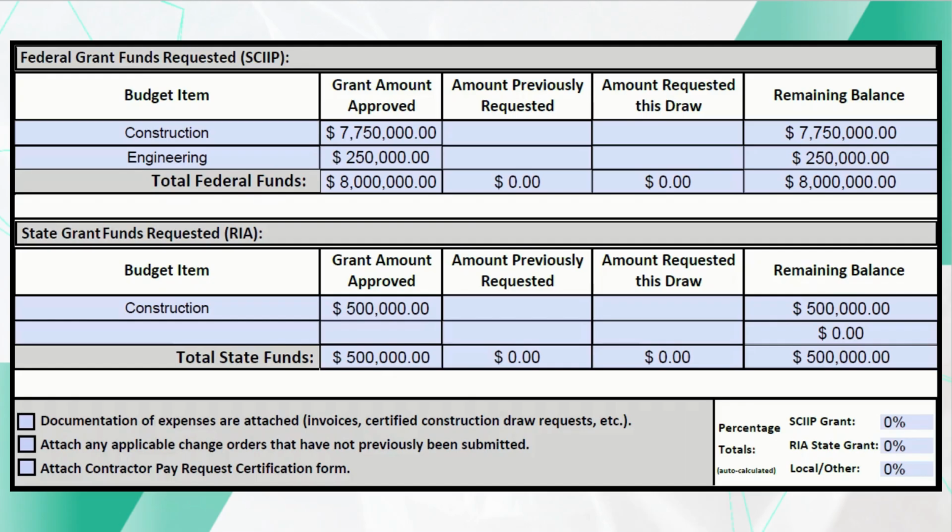These amounts can now be added to the RFP form in their respective categories. As this amount relates to construction, it will be recorded under the designated construction line item. Furthermore, with the approval of SCIP funding for engineering costs, a separate line item will also be created for that expense.